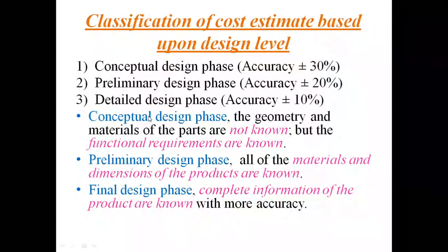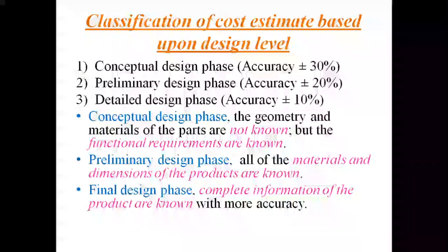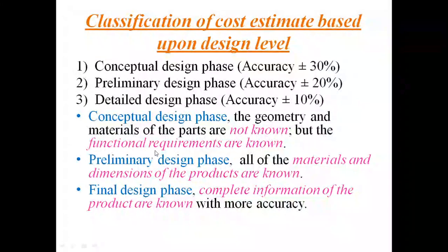First we see about conceptual design phase. In conceptual design phase, the geometry and material of the parts are not known, but functional requirements are known. The conceptual estimate is an estimate prepared by using engineering concepts and avoiding the counting of individual pieces.